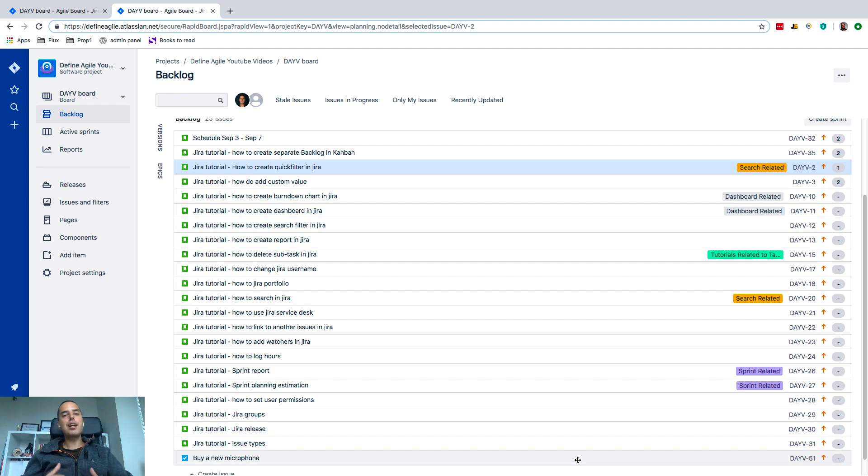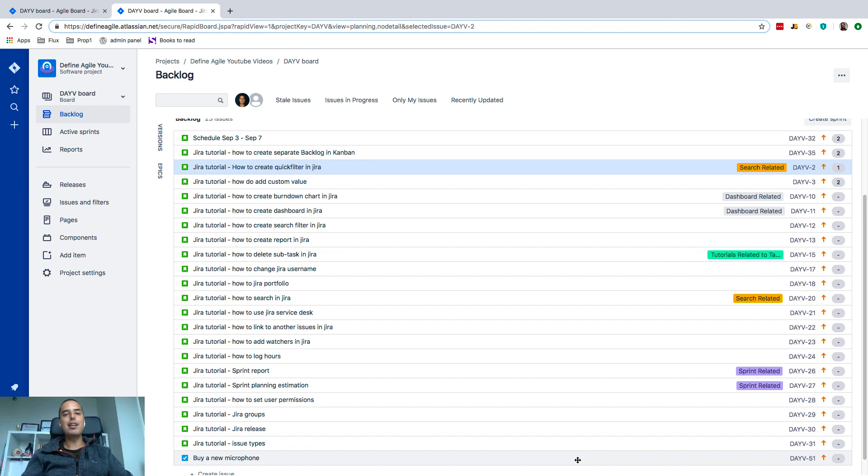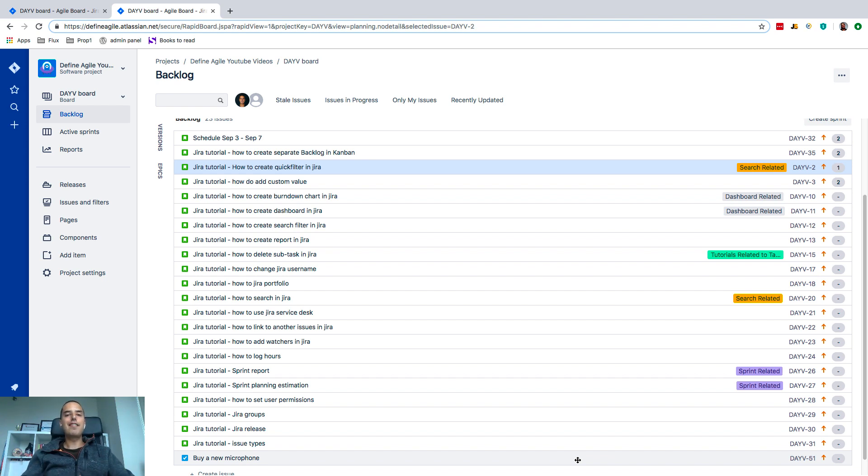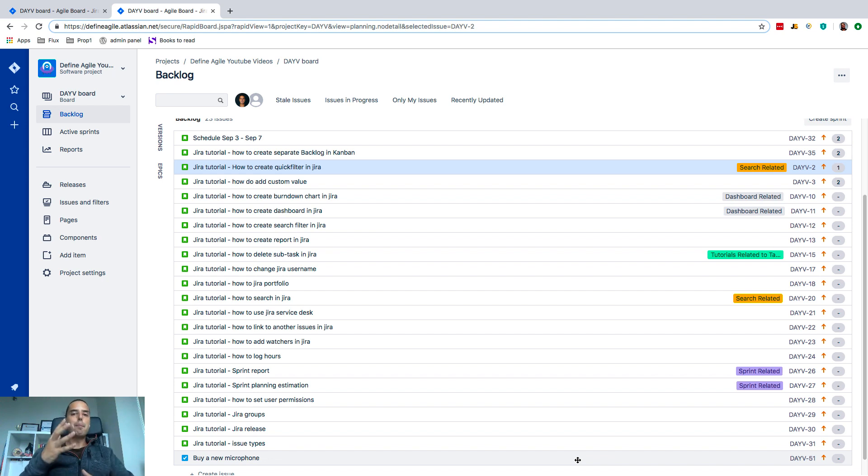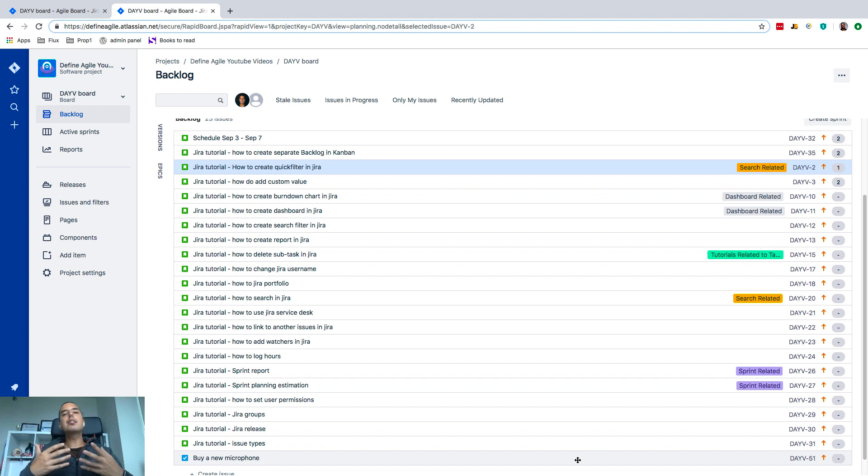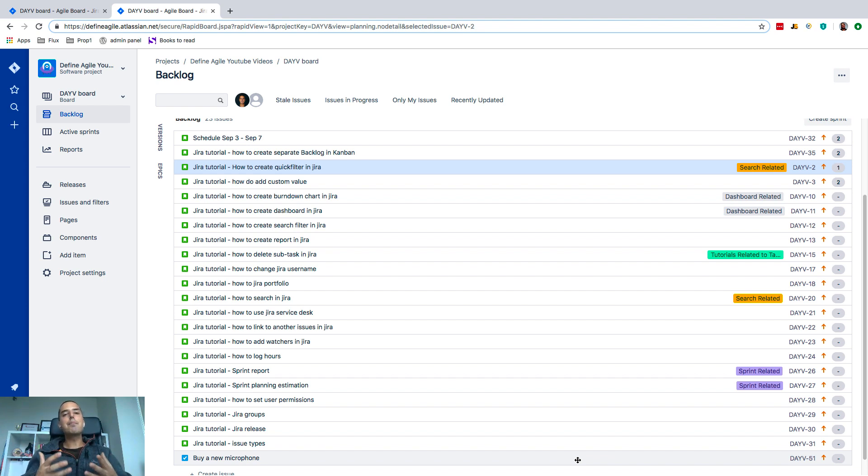For this reason, in my teams we do not estimate tasks. So tasks do not have story points, because for us story points is pure business value. See, if I know that we delivered 30 story points, we know that the value—it's pure business value of 30, and not like 10 of this was some business value and 10 of this we met a couple times, bought a microphone and stuff like that. We understand that there are things that... not everything can be a business value, and that's why we also have tasks.